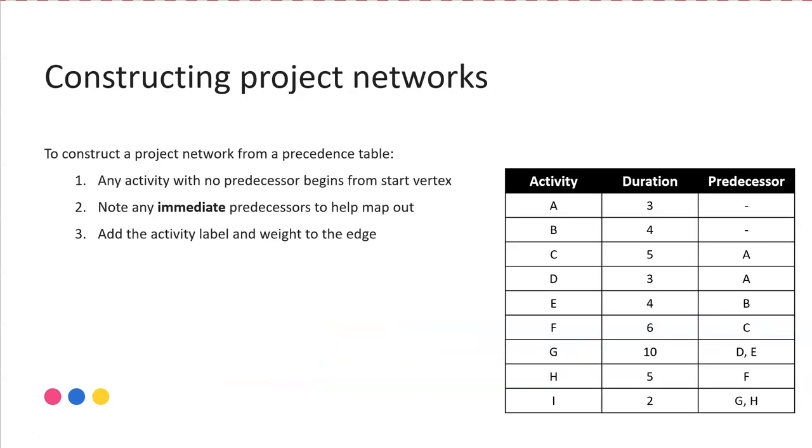Next we look at constructing project networks from the precedence table. If you have to draw something from scratch, it's a good idea to draw it in pencil because it can sometimes be tricky or challenging to visualize how the edges should flow until you get partway through. What you are looking for though, any edge that has no predecessor, like A and B here in the table, that means that they commence at the start. So we have a start of our project and we know that activity A and activity B will commence at that start point. And so we can add in our weights and we have activity A and B drawn in.